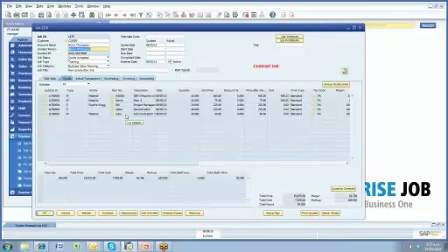We also have a bulk stock check. So at the beginning of a week, for example, you could do the stock check across all the jobs that are perhaps ready to go into production or at a certain status. It will then accumulate purchase orders to the same supplier. So I may have 15 jobs that I'm doing this week, and they all need items from one supplier, so it will generate one purchase order, but each different line on the purchase order would perhaps be relating to a different job.